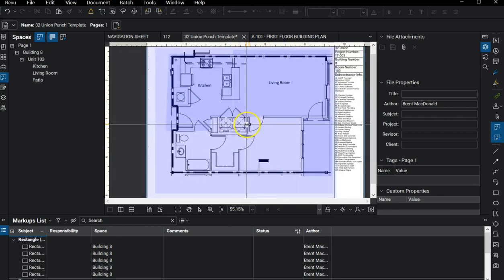So again, once you're done with all your spaces, you've basically set up your punch list to the starting point, where now I can use it even during an earlier part of the project, say the framing phase, where I can do a completion list for the framing contractor of some walls that might not be aligned where they need to be, or they're using the wrong layout with a stud, they're missing blocking, things of that nature.